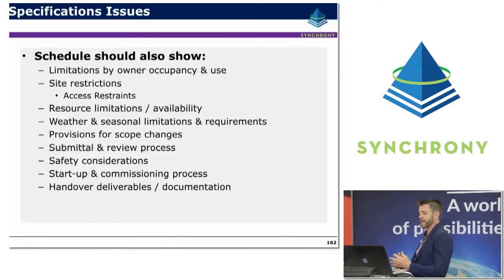Handover deliverables and documentation being a really key one because they're often something that's neglected towards the end of the job. So having a process in place where they're allocated within the schedule, within the work breakdown structure, and given a weighting so that there is that increased incentive to close those out towards the end of the job as well.